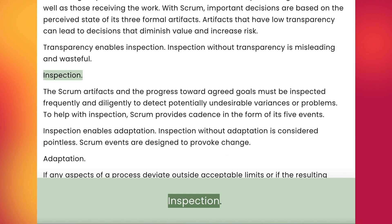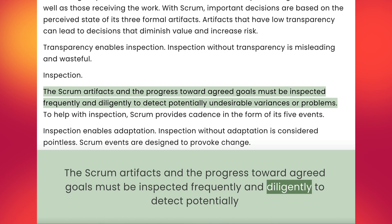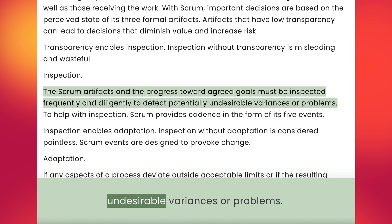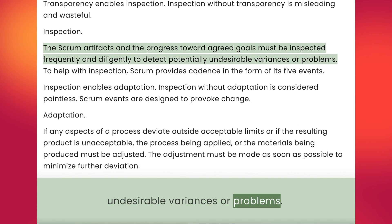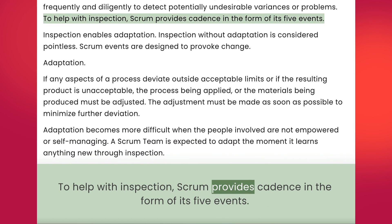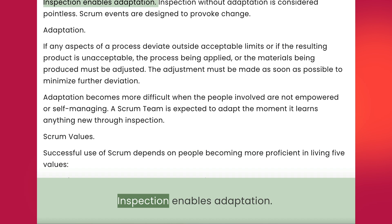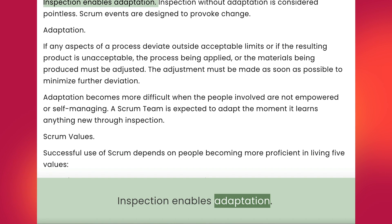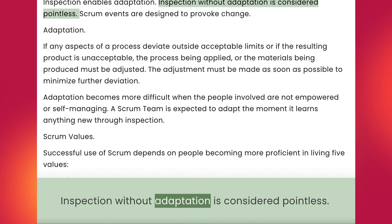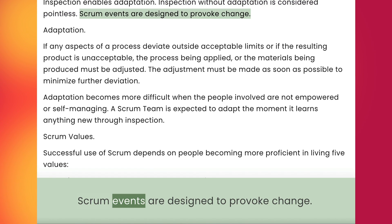Inspection. The Scrum artifacts and the progress toward agreed goals must be inspected frequently and diligently to detect potentially undesirable variances or problems. To help with inspection, Scrum provides cadence in the form of its five events. Inspection enables adaptation. Inspection without adaptation is considered pointless. Scrum events are designed to provoke change.